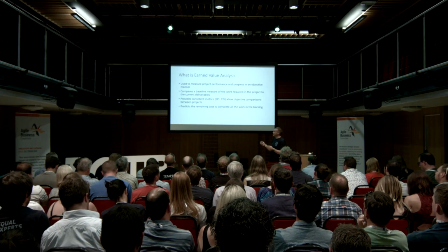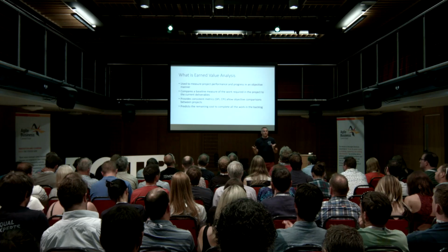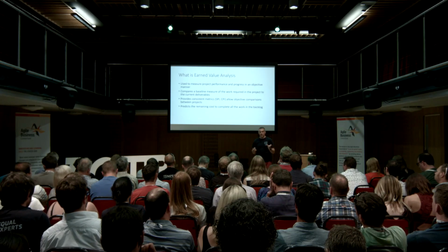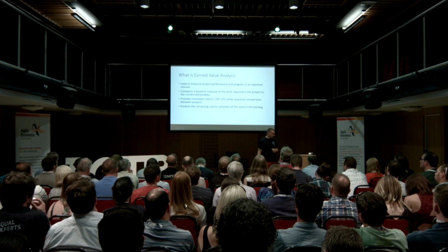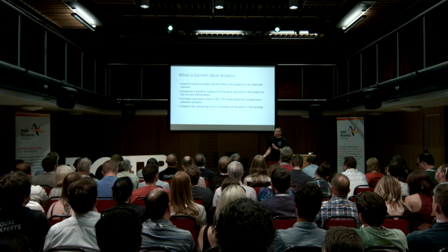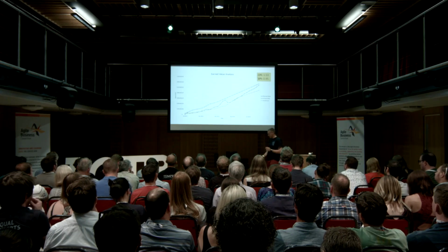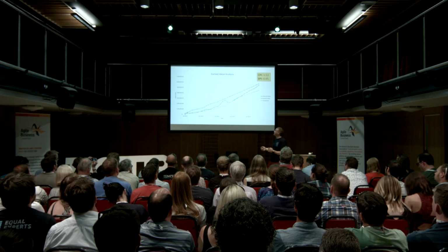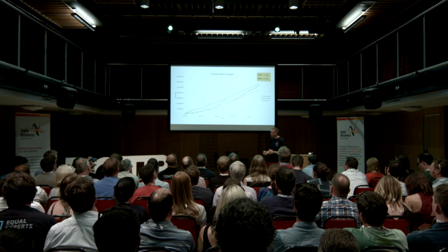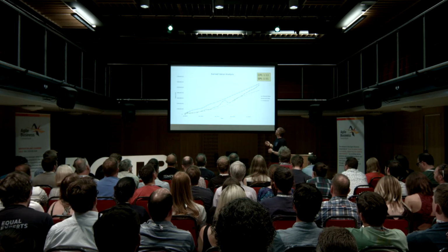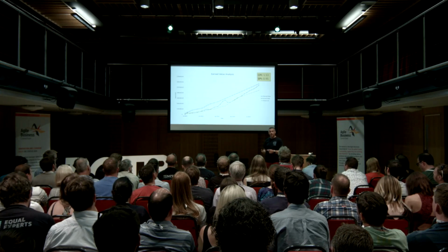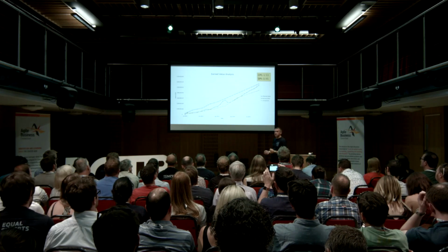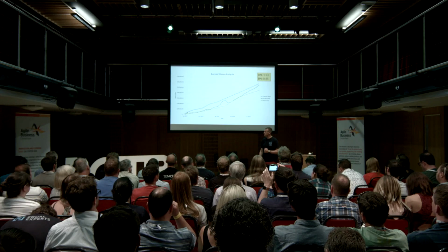It tries to give you some numbers that you can use to compare projects against each other without knowing anything about the detail of the project. So let's look at an example of what it looks like. It doesn't look massively different. We've got a blue line, which shows our ideal progress over time. The green line shows our actual progress, which is our earned value. And the yellow line shows the actual costs, so how much we have actually spent.